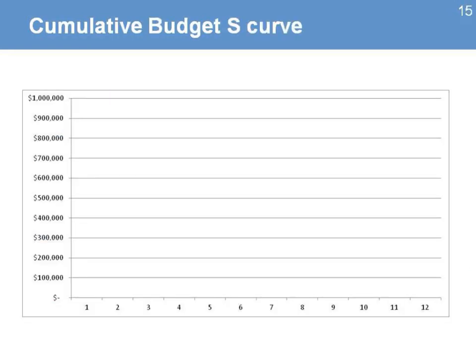The S-curve is another interesting tool. What it does is that it is a graphical representation of the cumulative planned cost of your project. And it looks like this. It's a curve that goes like that. And what it means is that as I plan my project, every month I accumulate all the values. And I can see at the beginning that some of those costs are not happening too much because I'm starting the project, so I'm not spending that much.